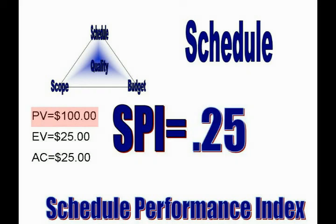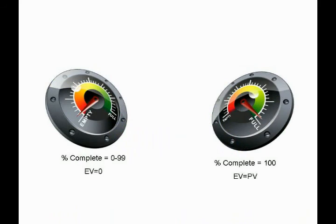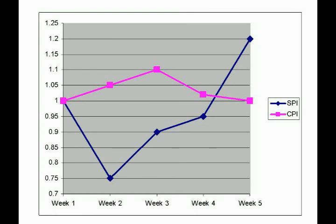The key to using the SPI to give an accurate snapshot of schedule performance requires implementing rules for recognizing value. I'm an advocate of the 0-100 method, where a task has no earned value until it's complete, and you wouldn't include an incomplete task in your SPI calculation unless it was past due. This gives a more accurate snapshot of the current schedule of the project. I'll go into rules for when to recognize value in a future video.